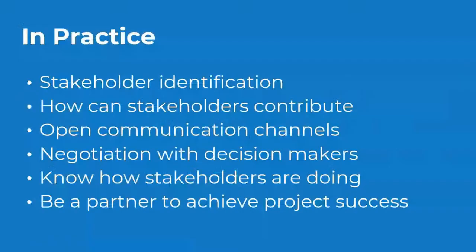In practical terms, stakeholder identification — actually knowing who your stakeholders are — is important. They need to be thoroughly identified and taken care of in an iterative way throughout the project; once is simply not enough, and stakeholders can change. With key stakeholders leaving, that can have a massive effect on your project. You want regular meetings, keeping communication channels open, and you need to negotiate with decision makers to navigate the complexity of competing, sometimes conflicting expectations. Metrics for stakeholders can be gathered through net promoter scores, surveys, and informal conversations. Show partnership with stakeholders to execute project success.